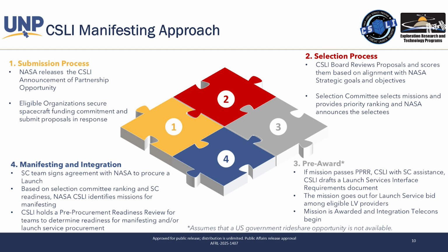And then when your readiness date comes up, pretty much almost a year prior to you being ready to launch, we hold what's called a pre-preparedness readiness review to determine your readiness and ensure that we actually are ready to go out. Your readiness date was purported as such and such, but we want to take one more final look under the hood to make sure that you are ready for us to go out and buy you a launch service.